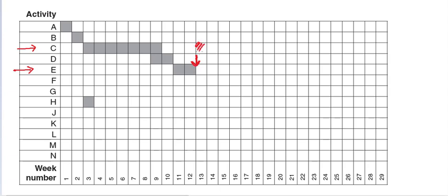So from here on, for 2 weeks, we are going to code some more, and during this time we can do module testing in parallel, just as we were doing activity C here, with module testing in parallel. We can do module testing in parallel as we are writing our code once again. So 2 weeks for writing code and 2 weeks for module testing, and there is going to be an overlap, just like there is an overlap here also, between C and D.